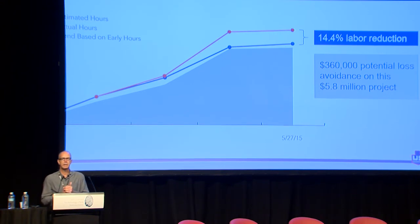It does take time because when we develop our BIM models, we aren't coding the BIM models at that time, right? Your coordination guys are making everything fit, and then they're spooling it for the fabrication shop. When we get to that point, somebody goes back and embeds the work breakdown structure in the model. The labor and material exists there all the time. We have written some scripts that allow us to change the work breakdown structure and the status all at one time. So we can draw a window around an area and make all objects within that window a certain work breakdown structure, but you have to laboriously go through the whole model and do it. But it's worthwhile. There's no doubt it's worthwhile.